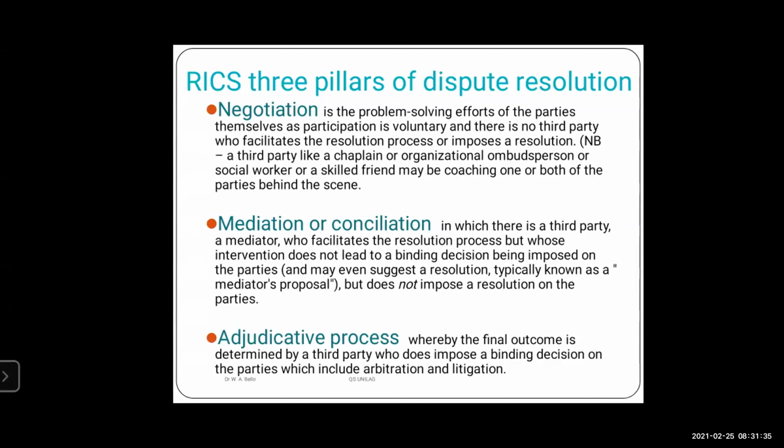Then we now have the third process, which is the adjudicative process. And of course, in the adjudicative process, according to the NIQS, that is the one where you have arbitration and litigation. As mentioned, the final outcome of the third party is imposing and it is binding. So the decision in arbitration and of course in litigation is binding on the parties. So whatever the pronouncement or decision is, it will be binding.